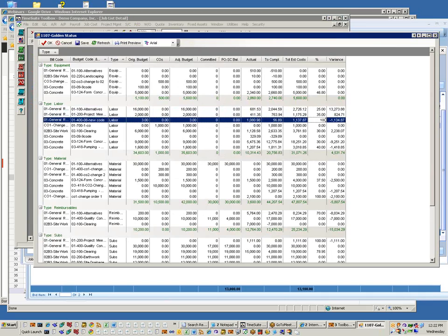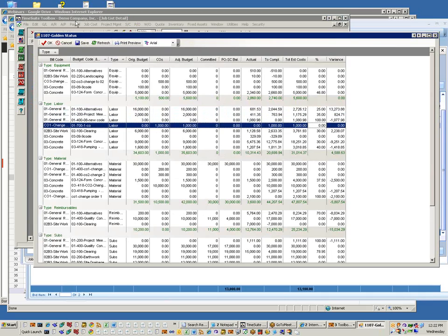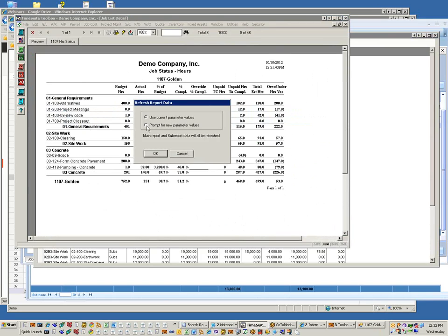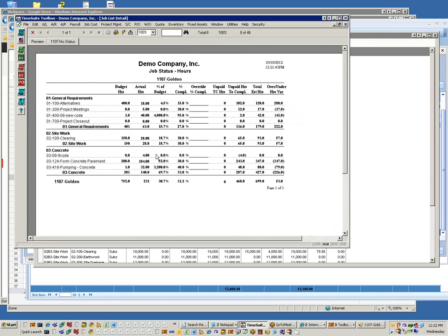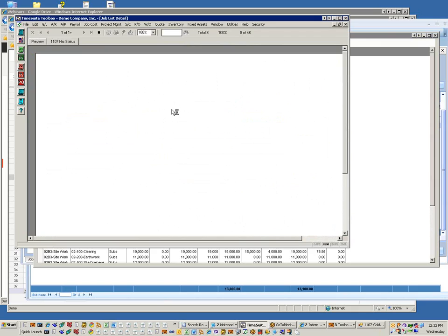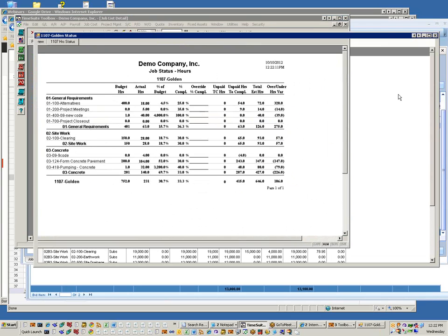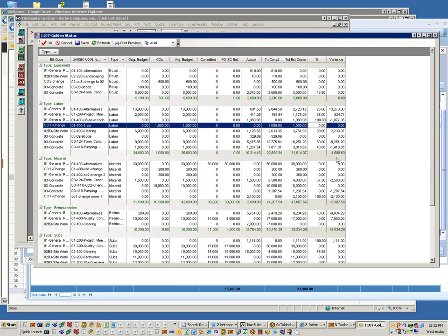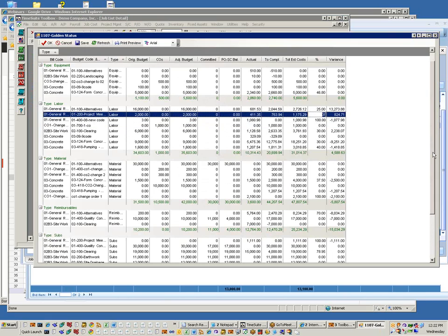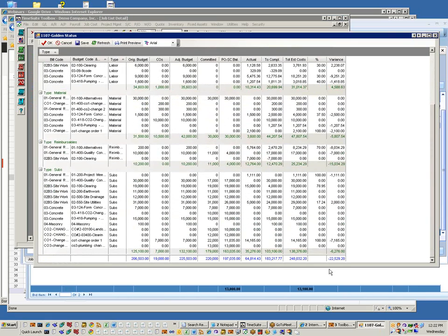Those are the percentages we bolted in here. So if we go 25, 35, 100, and hit save, and then refresh over here, it's going to recognize those percentages. See 25, 35, and 100. And then those give us an hours variance that we can give back to the field. And so this is their accountability reporting for labor. This function serves to feed our summary contracts something reasonable with respect to what's going on in the field.